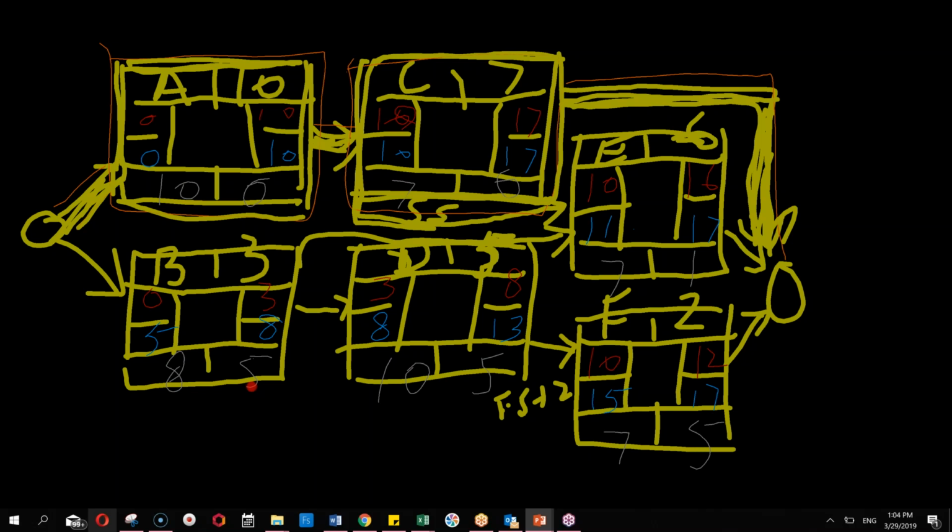Let me discuss that. B is finishing on 3 and E is starting on 10. So how much is the gap? 7. That means from B to E, there is a gap of 7 days. That means the float in between B and E, if there is no other dependency, is 7 days. This is the free float of B. Free float is that one activity can enjoy this much alone before starting the next activity. But this would only be applicable for this particular path.